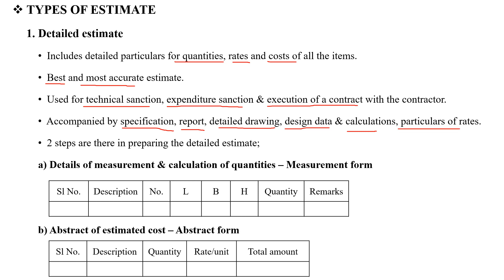We will use 2 steps to prepare this detailed estimate. Step 1: Details of measurement and calculation of quantities. This includes the measurement formula, serial numbers, details of the total numbers, length, breadth, height, quantity, and remarks.